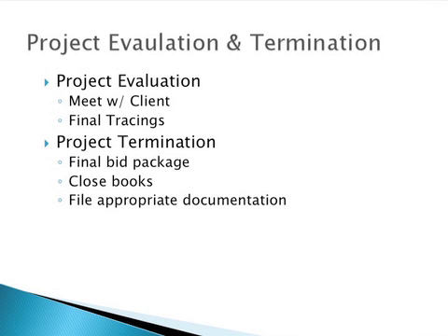Once approval is granted from the project evaluation step, the project termination can then commence. First, a final bid package is submitted to the client as well as the State Department of Transportation in order for the client to advertise the project to get construction bids for the construction of the trail.